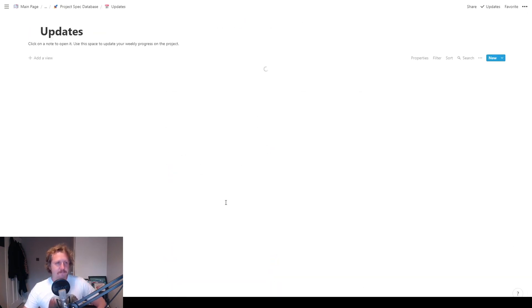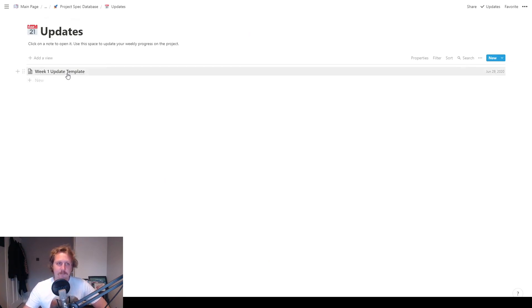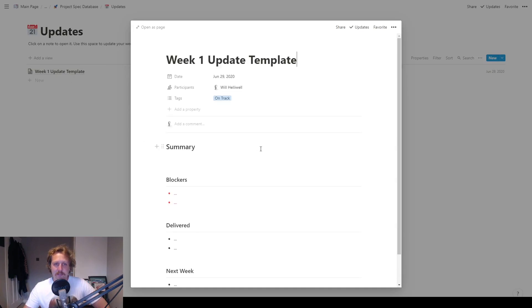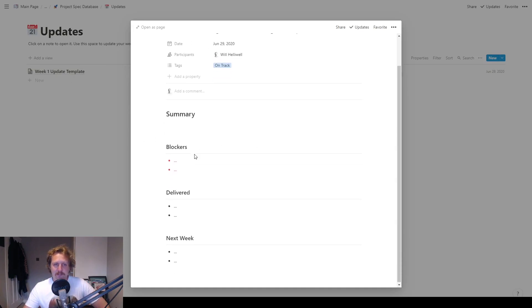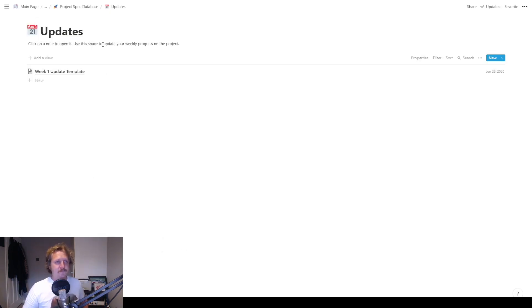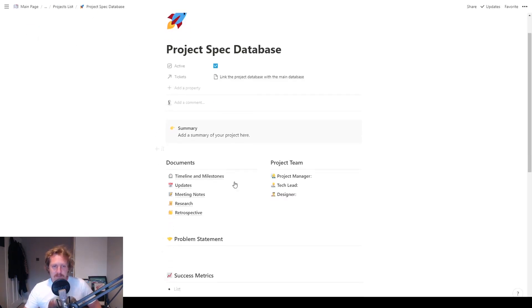Updates. So on the updates, you just click on a note to use it, and you just give kind of your weekly updates on the work you've maybe been doing. You just pop it in here. You've got a summary, anything that's blocking the work, what you delivered, and what you're going to do next week.